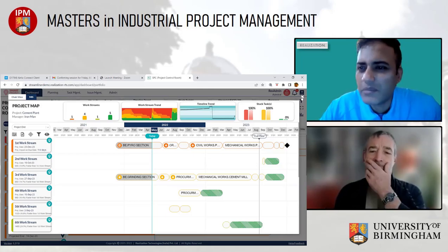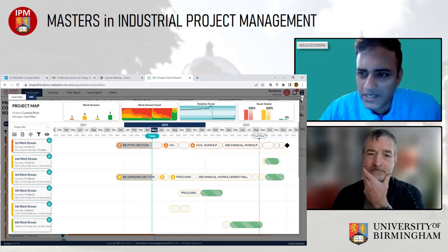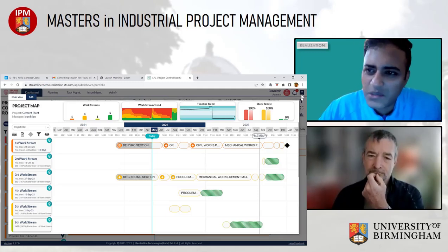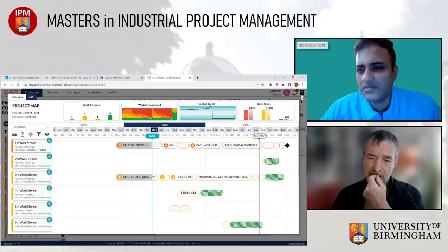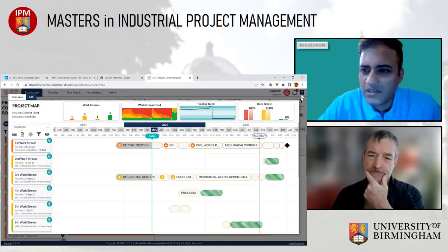Is your cycle time performance good? Is your full kit compliance good? When issues are raised to you from a red task, what is your response time? Is it good? So these are basically the three parameters on which the system tries to understand whether organizations are doing okay.